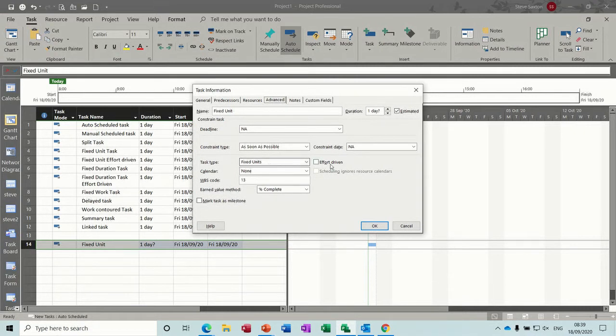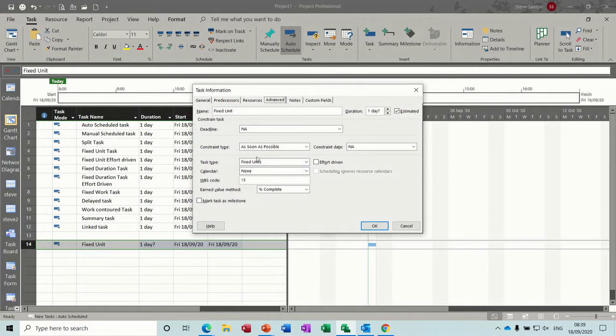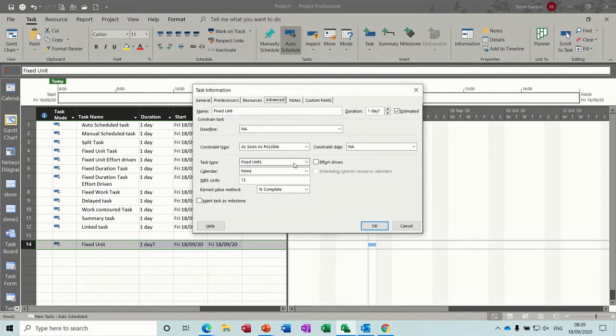And you can see also the effort driven tick is not on. So this really only applies when you're adding resources to tasks. You will see a difference if you've got the tick on there. I'll show you how that works in a second. But these are the main ones that you've got there. You've got fixed duration, fixed unit and fixed work.